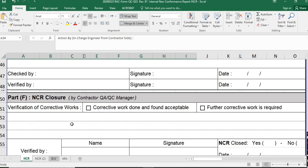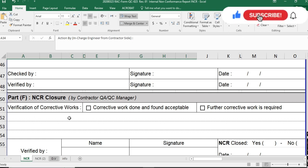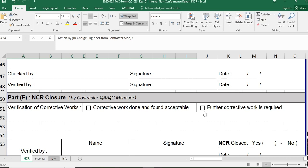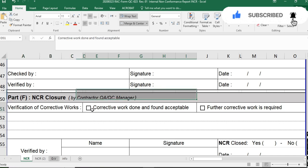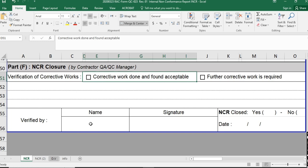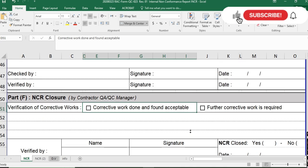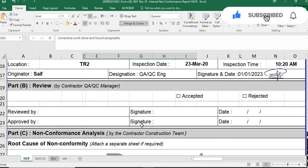When the construction team completes the corrective work, the QAQC engineer must inspect it. If the corrective work is found acceptable, you click the accepted option. If further corrective work is required, you click that option and resend the INCR to the construction team. Once corrective work is done and found acceptable, you close the NCR by filling in the engineer's name, signature, marking NCR closed as 'Yes', and adding the date.